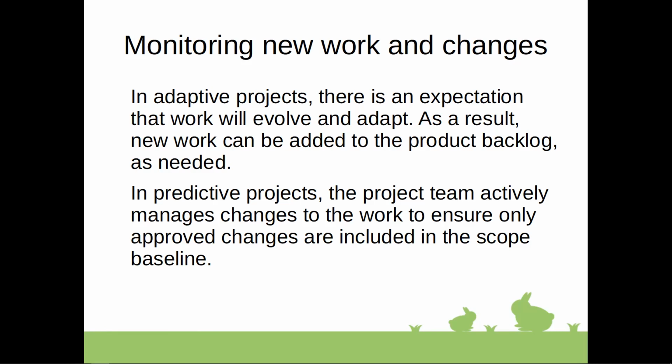So the project manager should work with the product owner to manage expectations around scope management and budget implications, availability of team members and other resources. So the product owner will prioritize the project backlog on an ongoing basis so that high priority tasks or items are completed first.